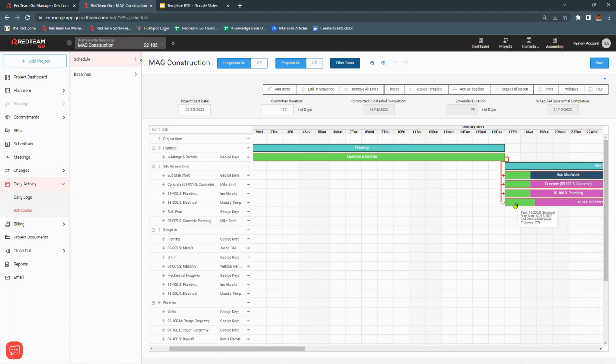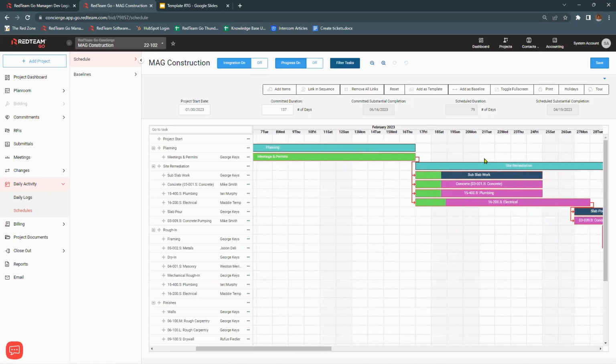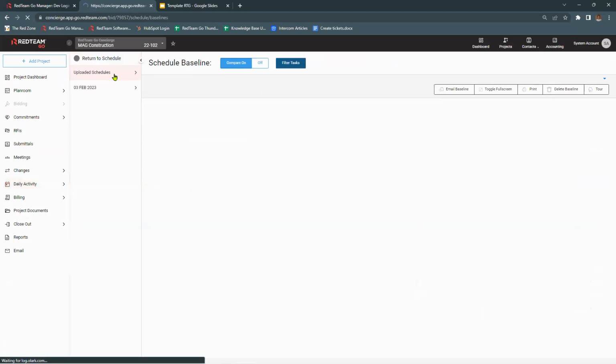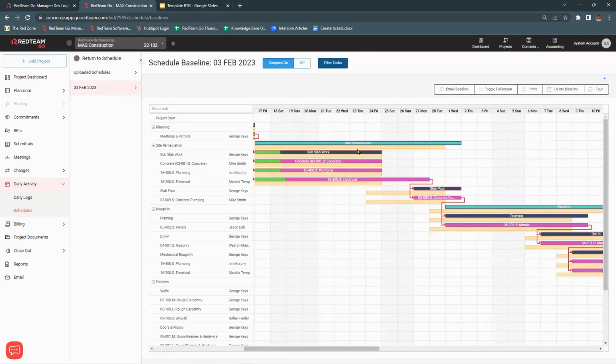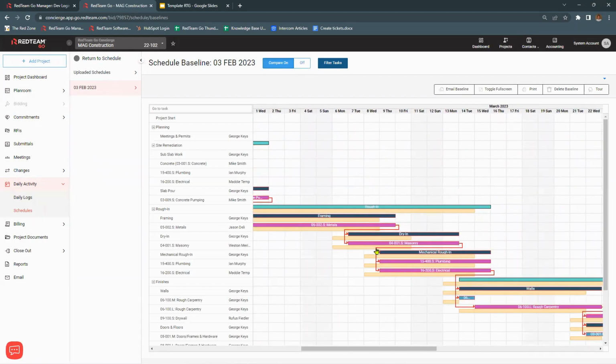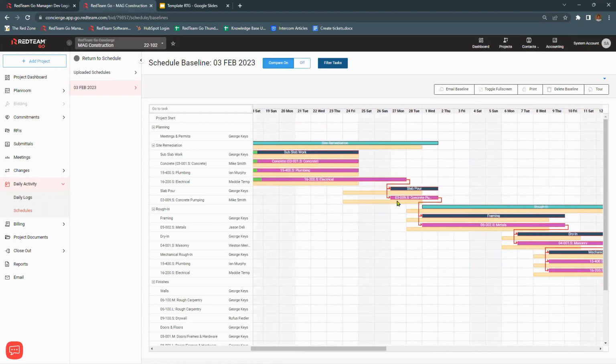And we can make arrangements. We can schedule a new projected completion date. We can enter the information about the subcontractor who was there, what was done. We can add comments. And then we've got the baseline that we created, so that we can always come back and compare if anything has changed on our job with the compare button. And again, we did make those changes here. So if we need to in the future, we can see how we can make up for that one day. Maybe we need to move these back, but until we make those changes, it's going to look like this.